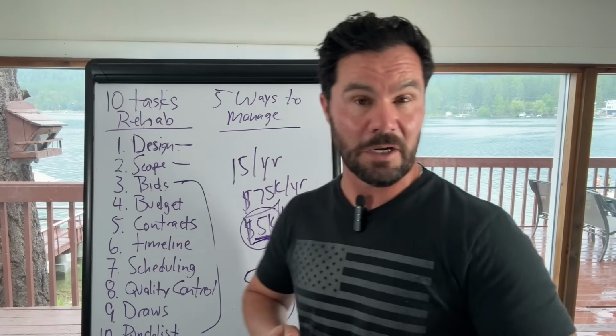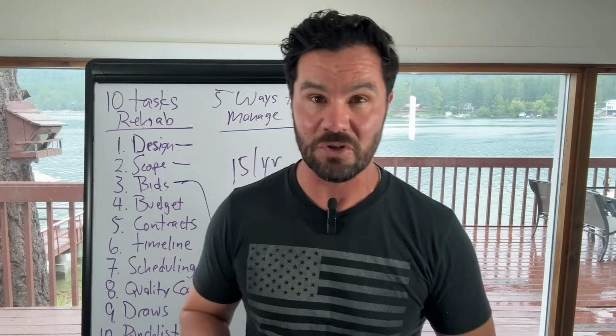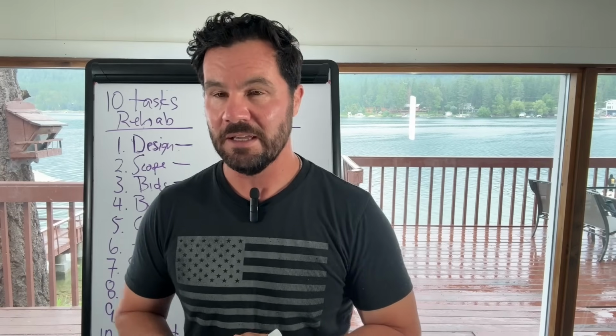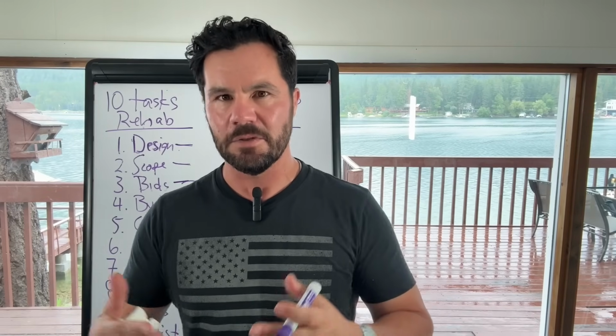And I'll do this on big projects. I do this on my multi-million-dollar new construction. I'll do a new construction project where I might have $100,000 in supervision, and I'll build that into my budget. It's one of my line items for a draw from my lenders, and I draw against it to pay my supervisor.